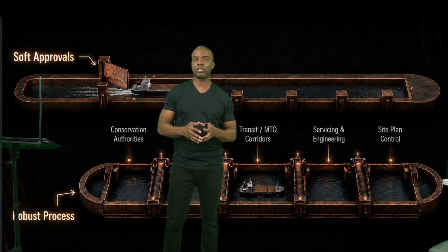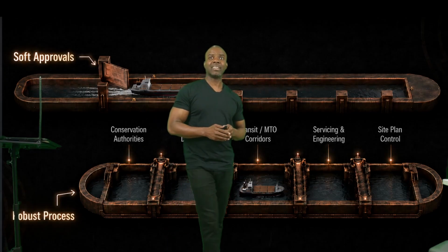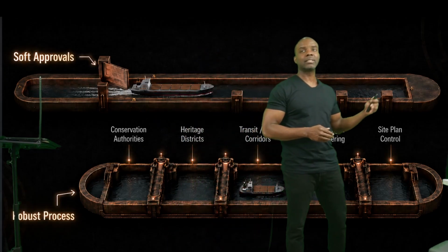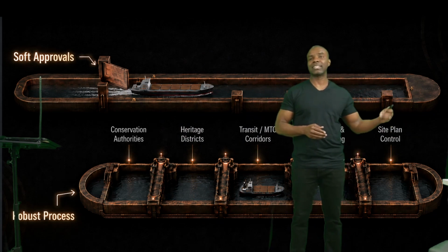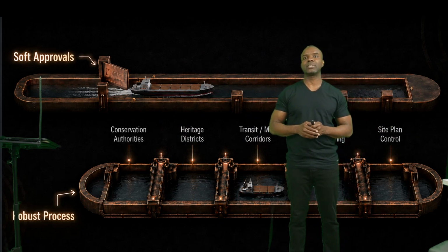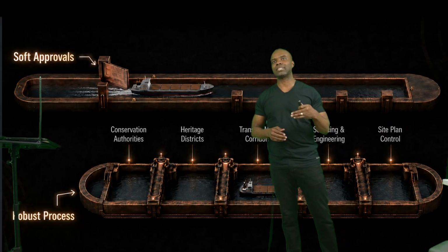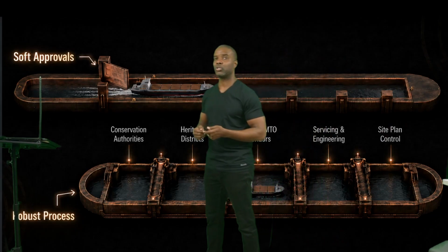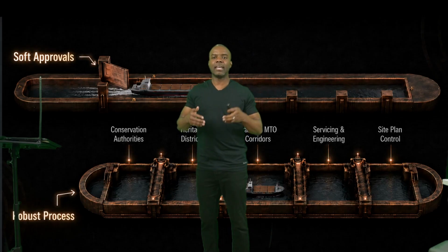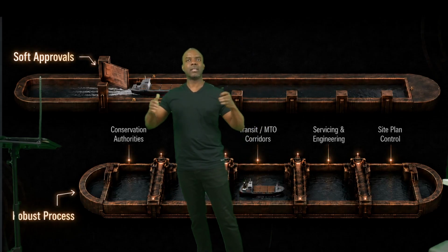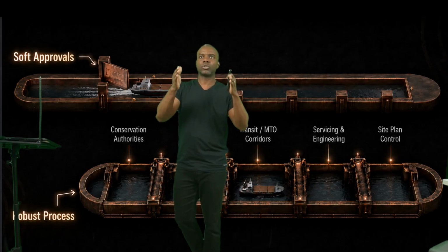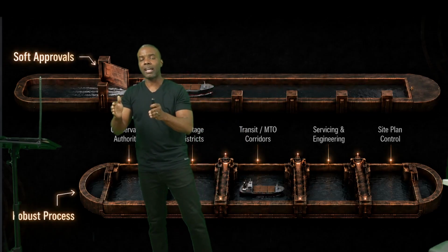As you can imagine. But with that said, when you go through a robust approval or your project has multiple different things that need to be addressed, you can see how that starts to take a lot of time every time you have to do this. And one of the main points I want to point to here is that this doesn't happen all at once, right? This happens in a very sequential manner. So nothing happens concurrently here.